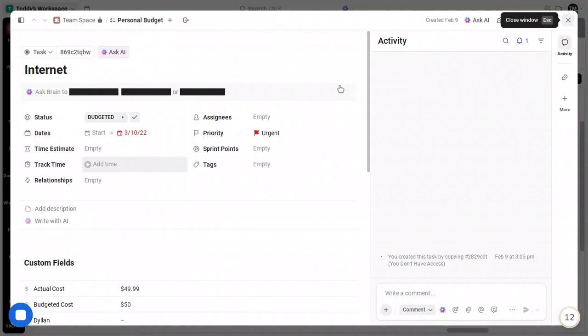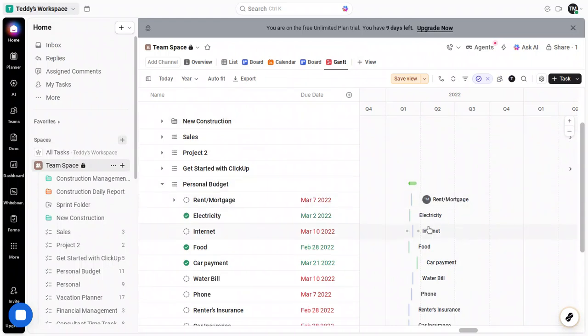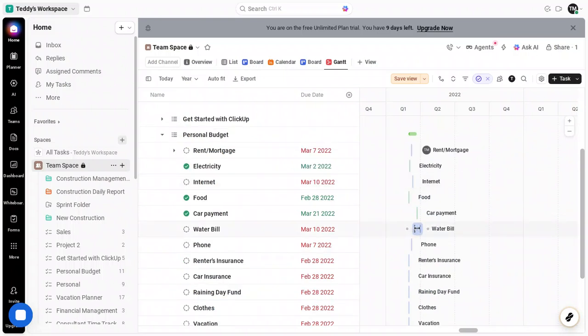You'll typically see options like Default, Priority, Status, and List. Default keeps everything the same base color. Priority uses the priority field to color bars differently. Status relies on where each task sits in its workflow. And List uses the list grouping color, so you can see structural groupings across the timeline. Let's start with Status, so you can watch the chart reflect your workflow in real time. Select Status.